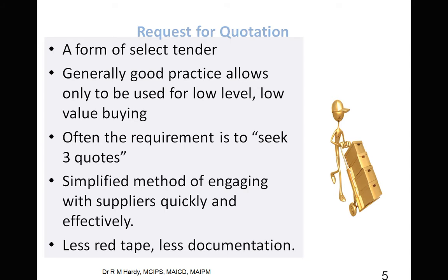So what you need to do here is to make sure that everybody who gives you a quotation gives you a nice, decent time of validity. Of course, then this person's second tender will have to wait 3 months before we can give them a decision, and we want them to stand behind their price for that period of time. So that's a minus. The informality means that things can change if things are dragged on for too long.